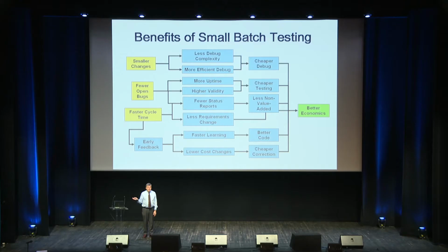Requirements change less when you have something in flight for a shorter period of time, because you operate in a changing world and you're not going to eliminate that changing world problem. It also provided faster feedback with the faster cycle time, so programmers could still remember what they were working on by the time they got the feedback, so it made it much more efficient in the process.